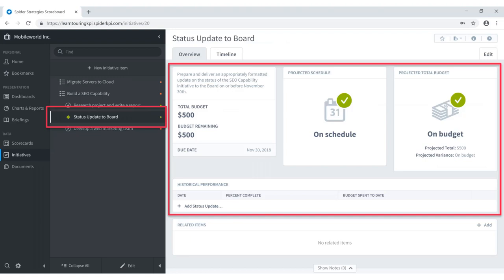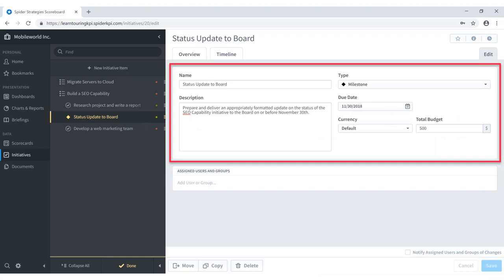Milestones have the same overview tab structure — you see the budget, budget remaining, due date, and whether you're on schedule or on budget. You can add status updates as you progress toward a defined milestone. Setup is very similar to initiatives and tasks, with the primary difference that there's no start date. Remember to select the type of milestone when setting it up, then provide a due date, budget information, and optionally assign users and groups.